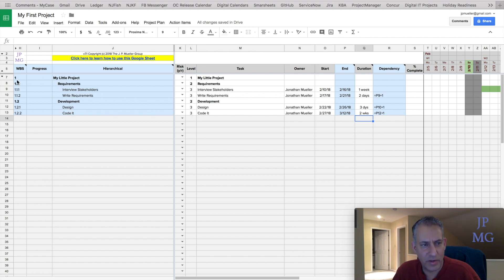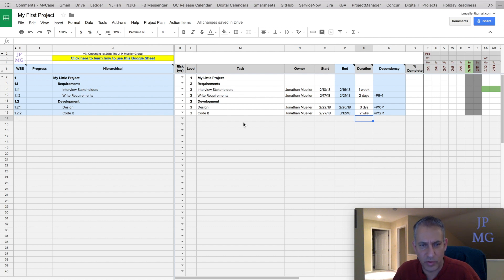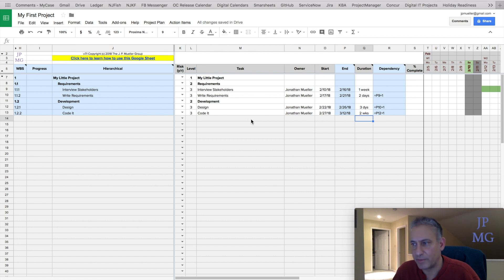Notice what it does here with the work breakdown structure numbering. It goes 1, 1.1, 1.1.1, 1.1.2, and then 1.2, 1.2.1, 1.2.2. So we start to build out that work breakdown structure.